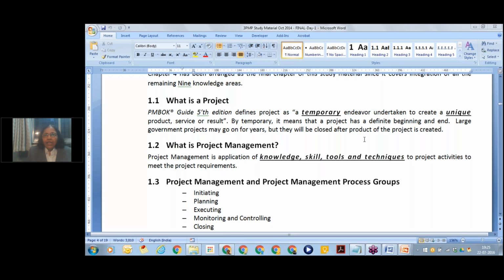Supposing your management has given you 5 crore rupees to construct a residential tower, like a 10-story tower only, and 5 crore they have given you, you have to complete those 10-story towers, all the flats, everything. Now they say out of that 5 crores, they need some money, and now they are willing to give you only 3 crores. So either the quality will suffer and the tower that you construct will be a low quality tower, or you will not be able to complete the scope.